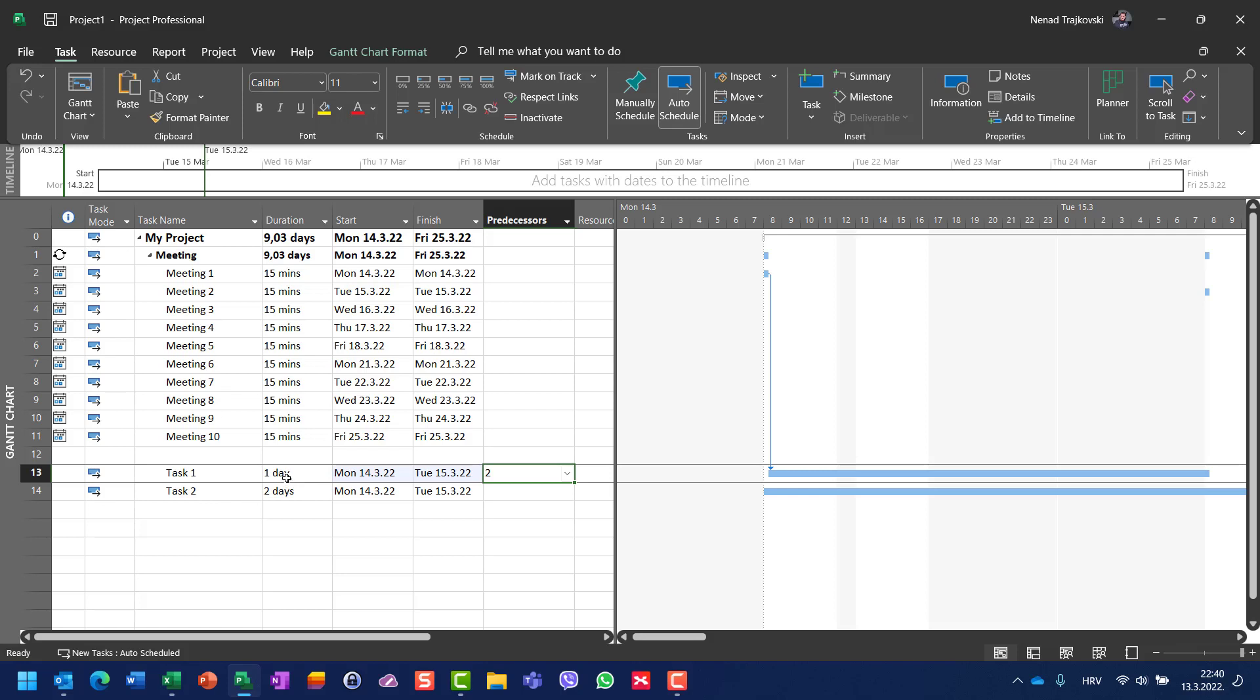Even if it has a duration of one day, at Monday 14th of March it will be finished at Tuesday. Why? Because it will start immediately after a meeting, and the meeting is supposed to be 15 minutes, from 8 to 8:15.